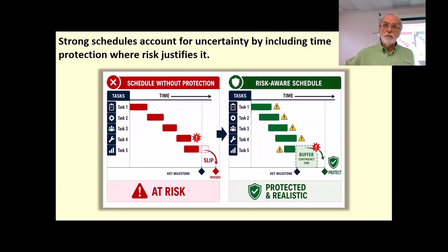Then on the next project, estimate more realistically based on what you learned, and continue that same learning activity on every project after that. You get to the point where there is less variance between your planned estimates and your actual delivery. We shrink that variance from a month down to maybe a couple of days. And you can only do that if you're transparent with everybody.